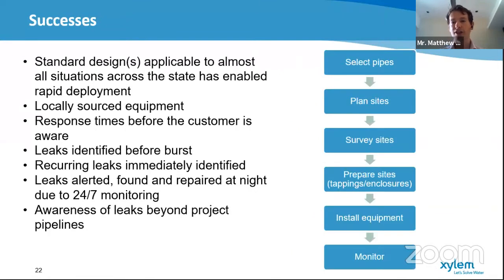So the successes of this type of deployment: we've managed to have a standard design that I mentioned that applies to most of the varied situations across Selangor. This has enabled the rapid deployment so that we can go from zero to several thousand sensors relatively quickly. We've managed to locally source a good portion of that equipment, which helps speed up the deployment.